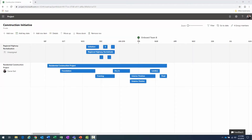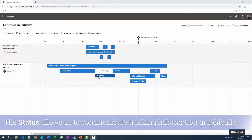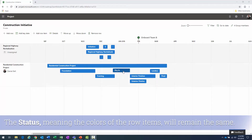Now let's look at changing status in a roadmap. I have a Regional Highway Revitalization row and a Residential Construction Project row. All the bars are currently the same color. In the real world, items will change status as the project is managed and tracked. As you connect rows — when the project changes, dates shift automatically — so the timeline will reflect reality, but statuses must be changed manually inside this tool.